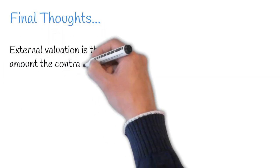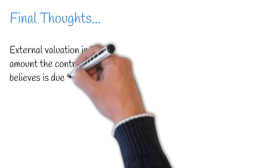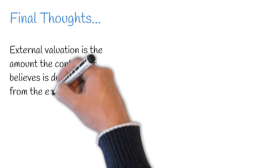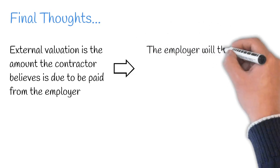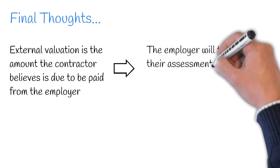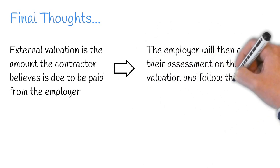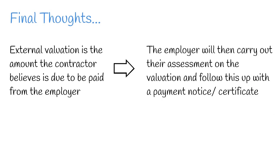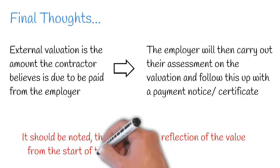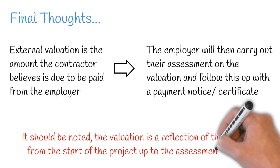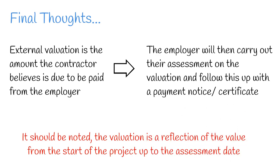The valuation determines what amount the contractor believes is due to be paid from the employer. The employer will then carry out their assessment on the valuation and follow this up with a payment notice/certificate. It should be noted that the valuation is a reflection of the value from the start of the project up to the assessment date, not the value since the previous assessment date.